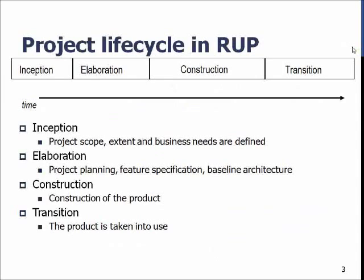The Inception phase has the following objective: the project scope, extent, and business needs are defined. Importantly, Inception isn't strongly committed to developing the entire project, because here we study the business and monetary issues — for example, how much it would cost to develop the software. This means Inception can result in concluding that the project is not economically feasible, and we simply disband it at this point.